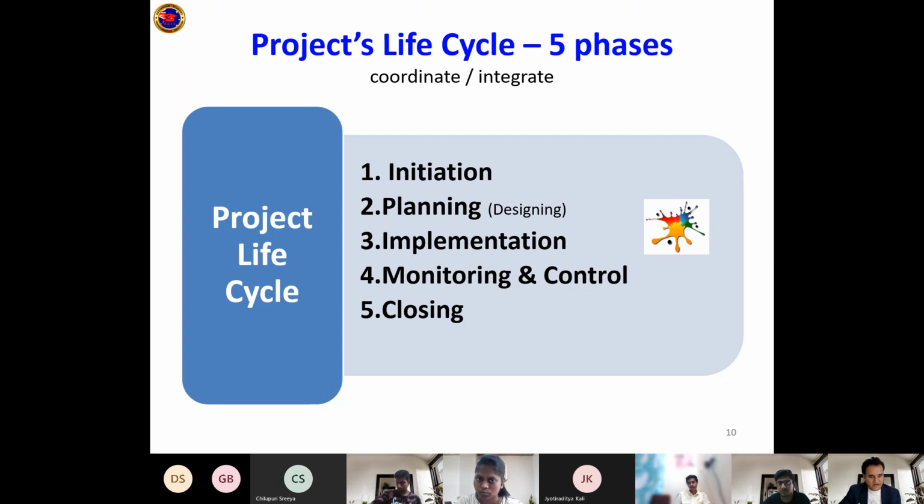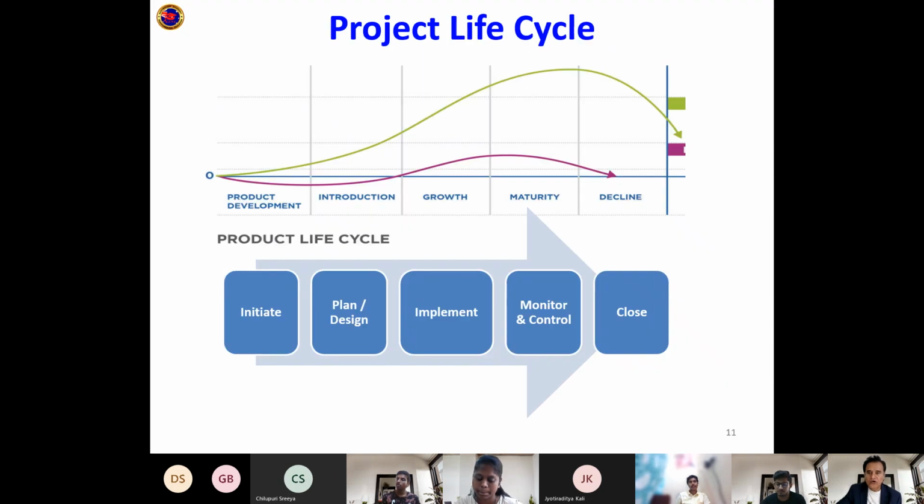Okay. So you will see these templates that we are going to use. No rocket science. It's all open book. But what you need to know, each template at the end should have a signature block. The signature block should have a place where someone signs and someone puts a date handwritten, not electronic, like a bank check. Okay, so we understood this project life cycle now.